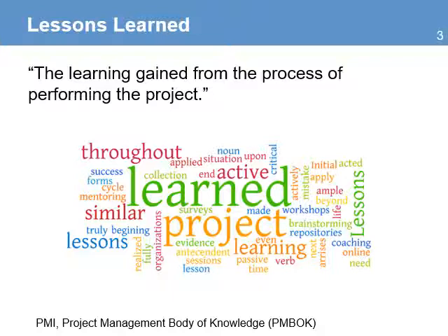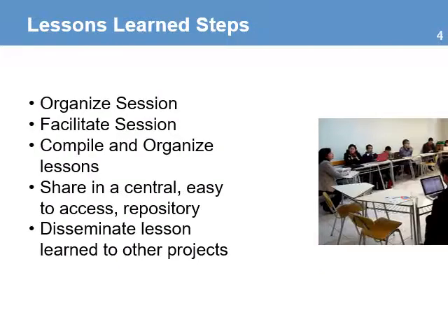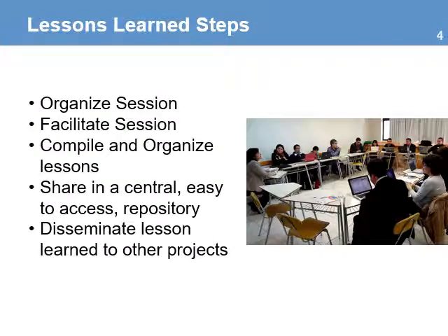This is an opportunity to capture the experiences earned in the project and then share them with the rest of the organization. Here are some steps you can take to conduct an effective lessons learned session. You need to organize the session well in advance with an agenda and the objectives of the session. You need to decide who will facilitate the session. If you have some funds, you should definitely look for an external facilitator.